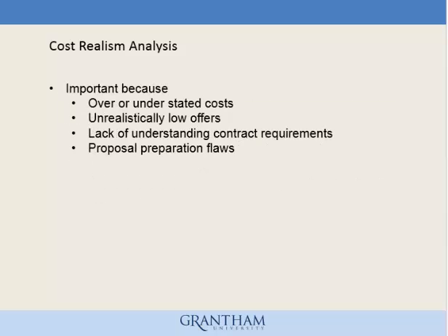Cost realism analysis is important because it can help you determine whether costs may be over or understated. In some instances, an understated contract price is a conscientious effort and can be a strategy for a potential contractor to get their foot in the door, so to say. A cost realism analysis can help you identify unrealistically low offers or where the industry may have a lack of understanding of the contract requirements. It can help bring to the forefront if a potential contractor did not properly coordinate proposal preparation.